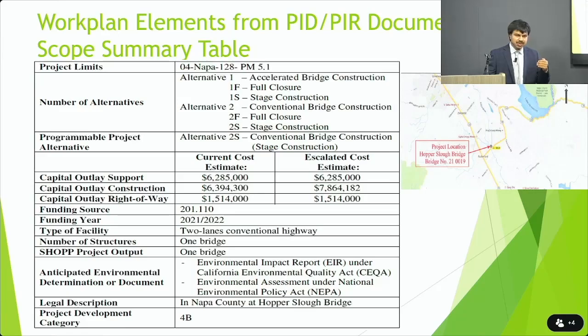So as a PM, it's one of your responsibilities to make sure, based on the scope, this is the right program code for this project or not. For example, 010, I think the common ones most of you might be familiar with is storm damage projects. Typically, whenever there is a season, you program more storm damage projects. Typically, they fall under program code 130 or 131. So for example, for safety, I think 010. For the bridges, 110. So there's an accounting bulletin that shows you, you don't have to remember anything, but there are different program codes. As you spend time in project management, you would know those codes. And it's one of your responsibilities to make sure your project scope aligns with the program codes. And